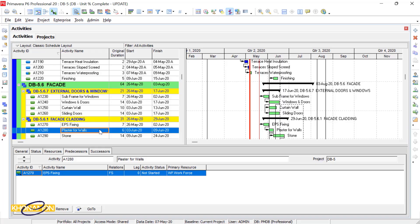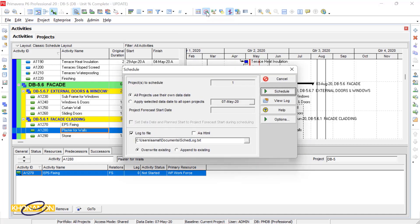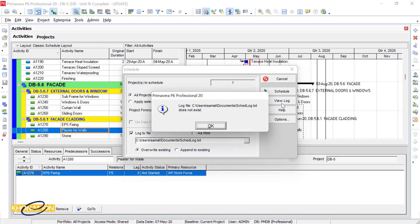For getting the log report, I press on the schedule icon or F9 from the keyboard. The schedule window opens. I press on View Log. It says there is no log report exists.